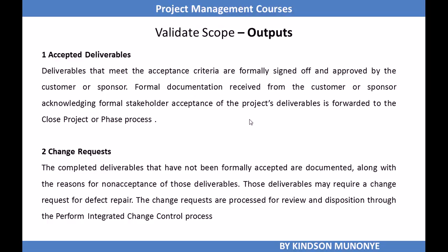Now, formal documentation is very, very important. You need to receive this sign off from the customer. If not, it can't be called an accepted deliverable, or maybe an email giving an acceptance of these deliverables needs to be provided by the customer.